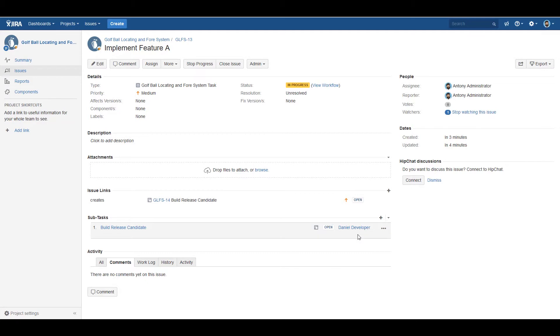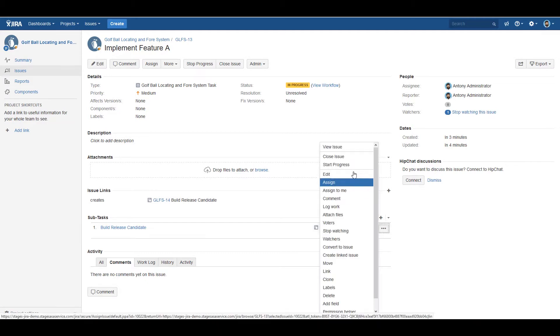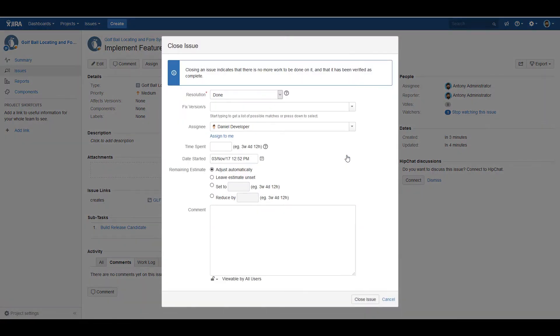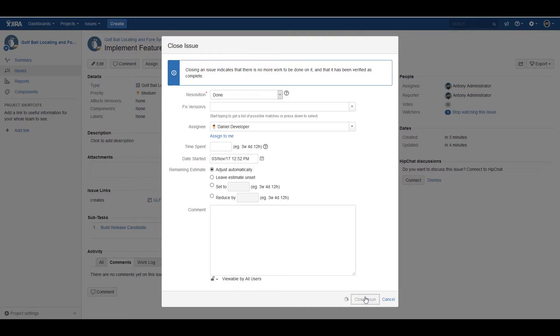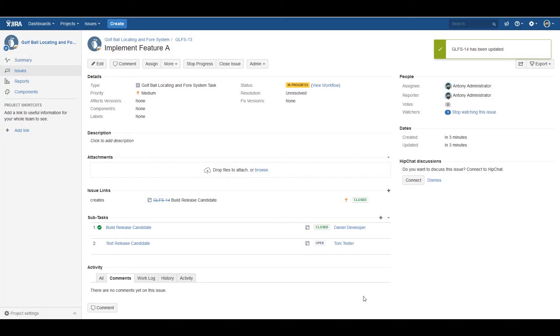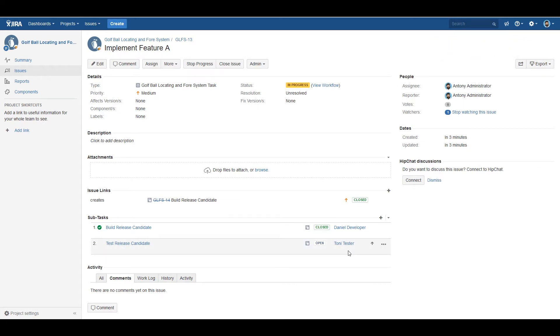and assigns it to the right person to fill the role of developer. As Daniel developer closes his issue, automatically information is filled out, and the automation kicks in again to create the follow-up task of test release candidate, assigning it to Tony tester.